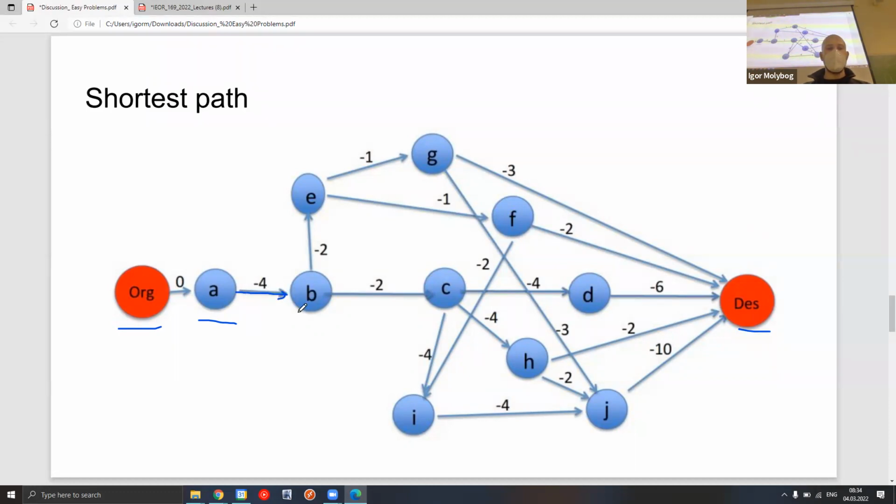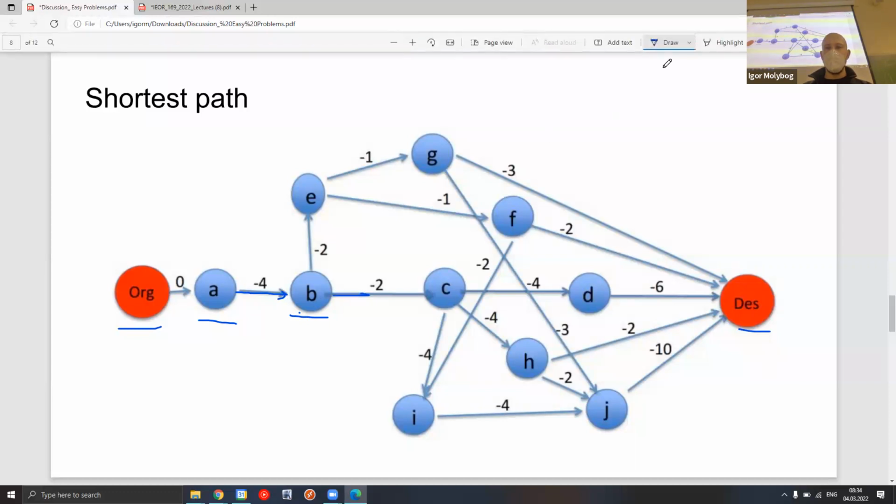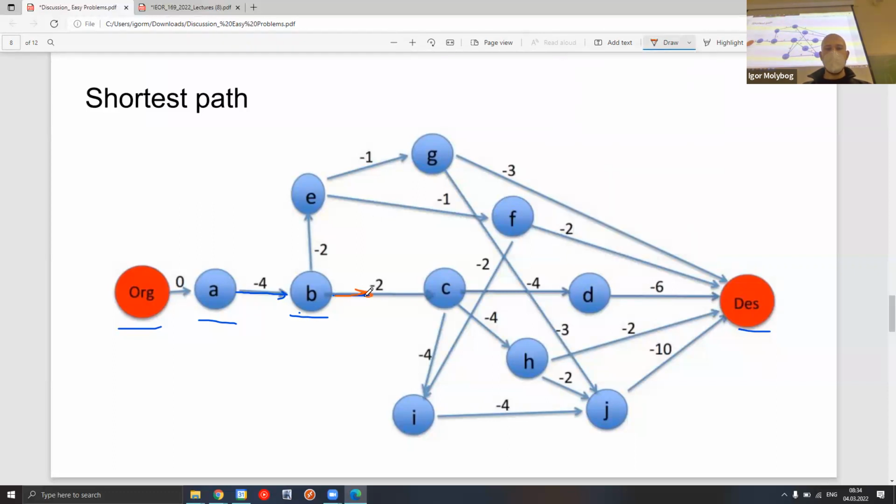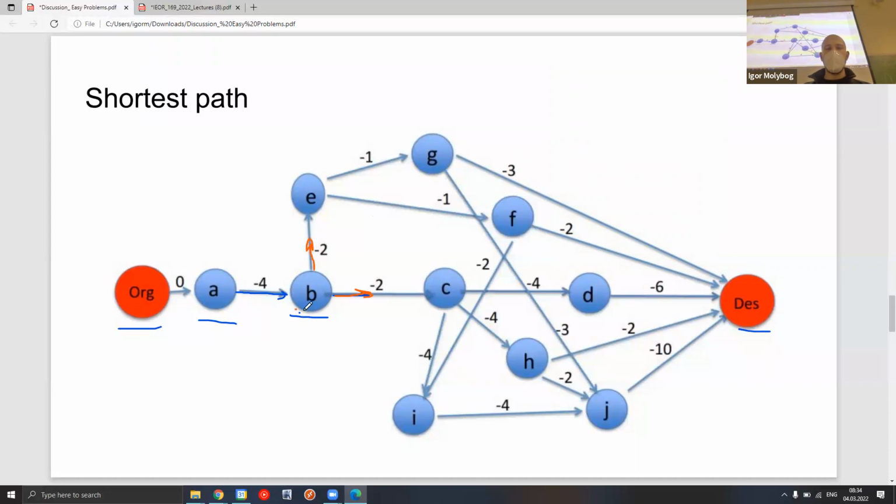Now you can start completing task B, and when you're completing task B, you're essentially taking both paths. You're taking this path right here, and you're taking this path right here at the same time, simultaneously, because when you have completed task B, you can start task E and task C simultaneously.